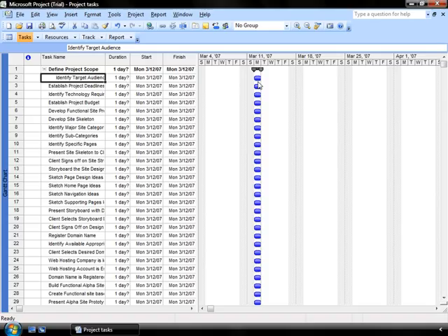Now there's another way that you can identify a subtask or create a subtask. Again, select the task that you'd like to identify as a subtask. Bring your mouse over to the beginning of the text, and you'll notice it's now turned into a double-sided arrow. As you click on that, you can now drag that subtask and indent it. Notice the large line that's coming up, and I just pull it in to the level that I would like it to be with the other subtasks. As I release my mouse, it now moves that particular task over to become a subtask.